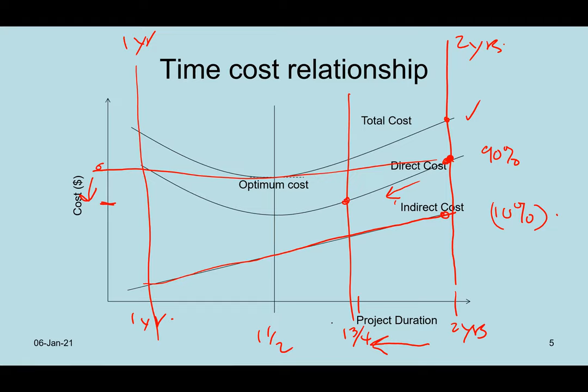And then if you reduce the duration, perhaps there is possibility that the project cost will be reduced again until whichever the limit that you can reduce, okay? In order to see this thing, that's why you need to do some kind of simulation. If you do the project scheduling in Microsoft or any computer software, then you should be able to see. Once you reduce certain duration, then the project cost would be reduced subsequently.